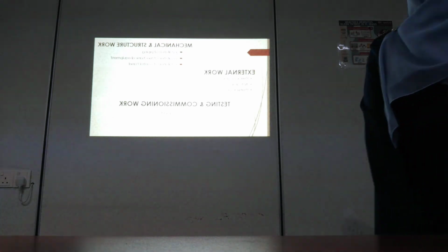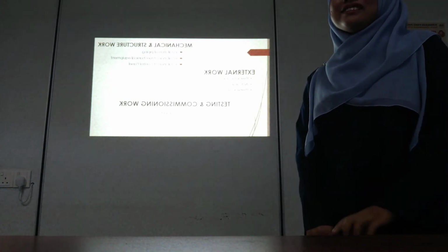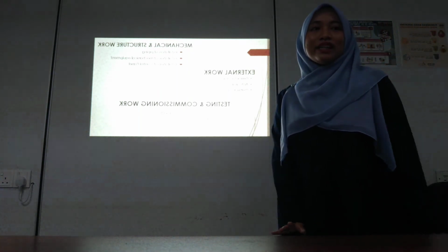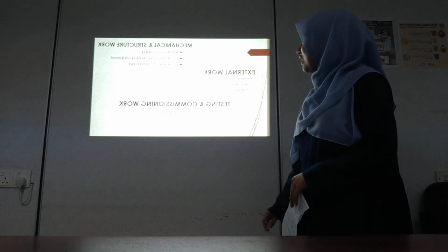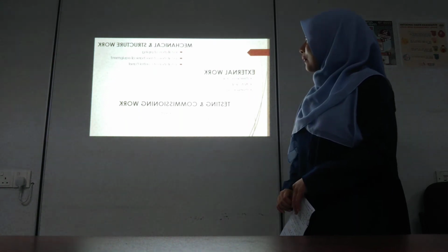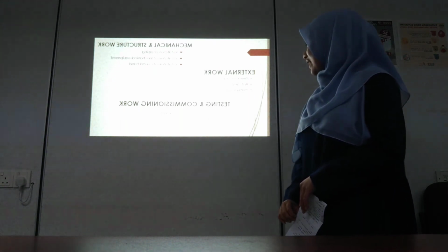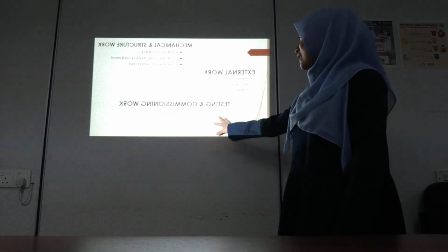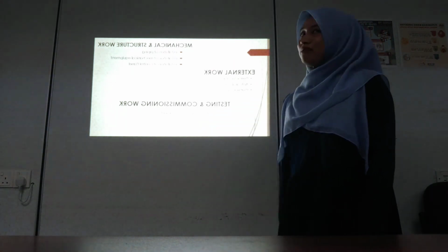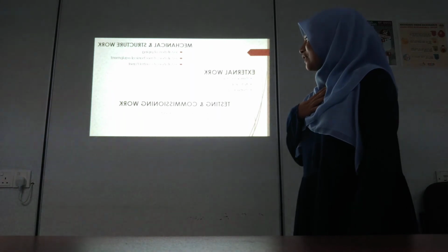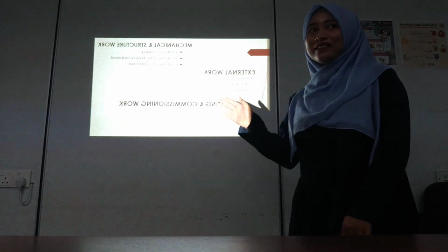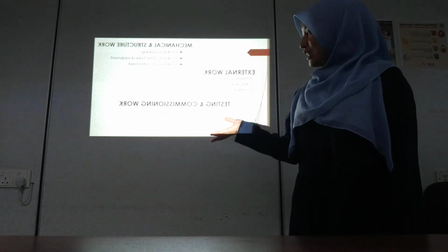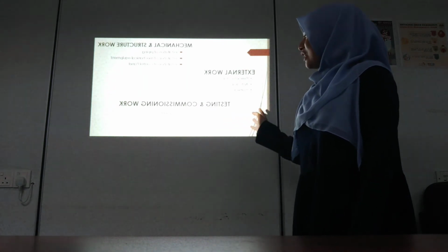This is the last step. Mechanical and structure work, which is installation of piping, mechanical equipment, installation of control panel. Then external work, perimeter drain, anti-class fence, ceramic work, testing and commissioning work, PDC 6 and PDC 8 comment, comply. And then if everything is complied, the comments from the indoor water, so the handing over process.